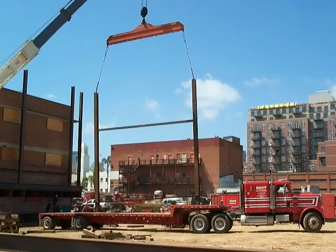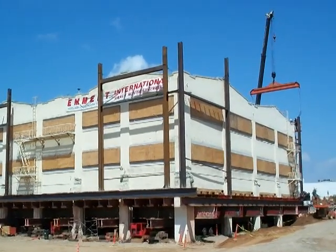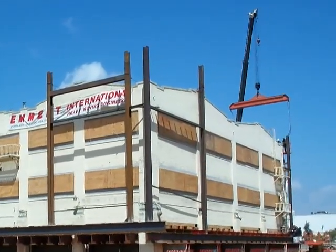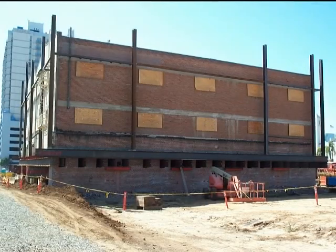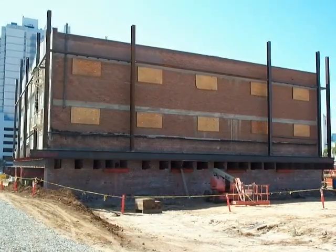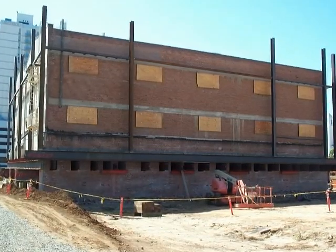When the support structure was complete and pressurized, one other problem existed. Emmert had to ensure that the building maintained its position on the support structure and that the corners of the support structure did not sag when the building was elevated for the move. Emmert solved this problem with the installation of a frame on top of the cross steel and around the entire structure. This steel frame with steel cables tied diagonally over the top of the roof held the building in place and ensured that the corners did not sag during the move.